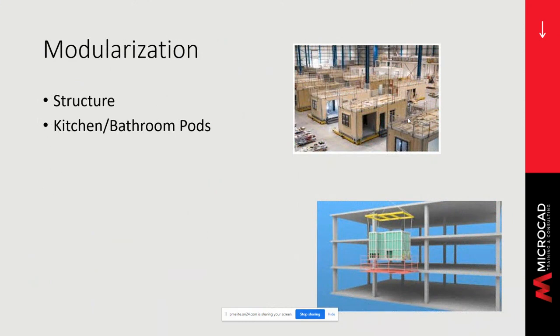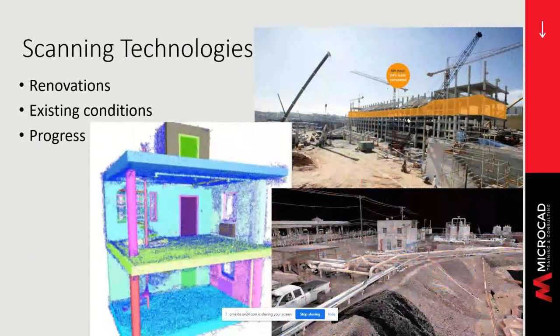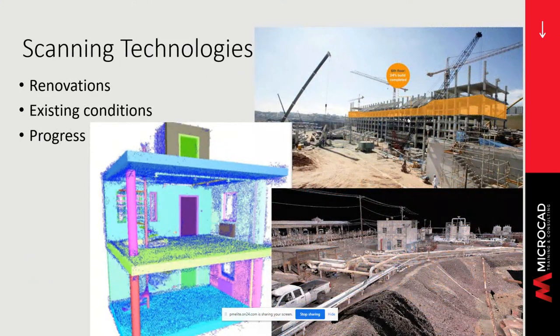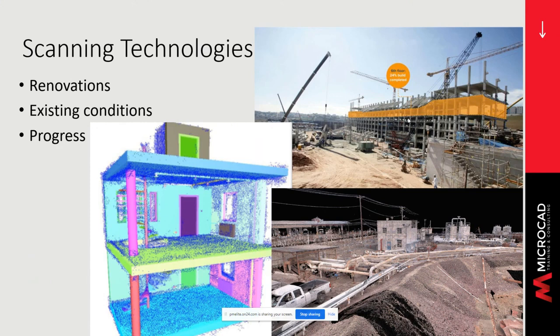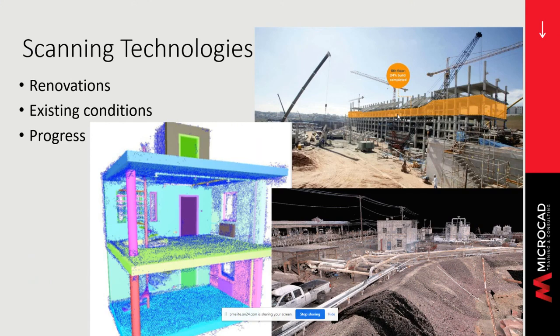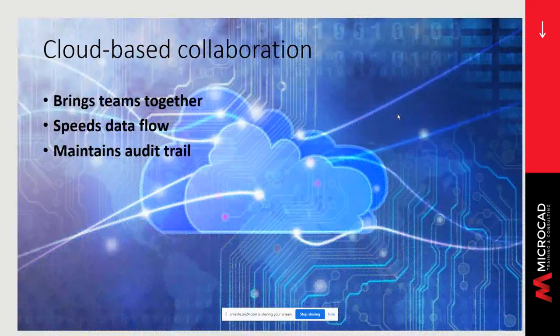Prefabricated modules have become common for walls, kitchens, and bathrooms. The ability to fabricate these units in a clean, controlled factory environment reduces labor costs and increases quality. Scanning technologies let us understand the existing conditions, whether it's a renovation or a new structure. It allows the field to verify exactly where existing components are and can monitor progress. But all of these need lots of data. BIM, by its very nature, is data-centric, which leads us to another new technology, the cloud.